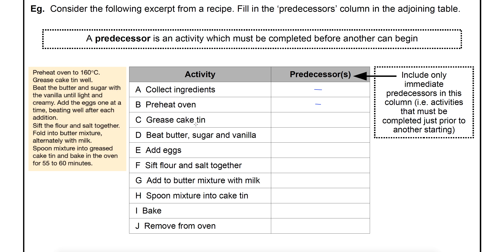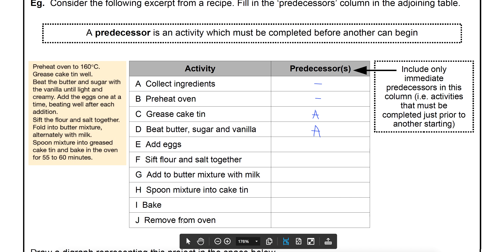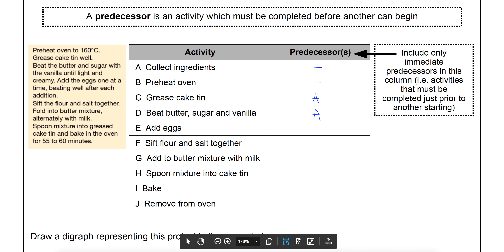The next one is to grease the cake tin. This one has a predecessor because you're going to need something to grease it with — whether it be butter or oil. So you'll have needed to collect your ingredients before you do that, meaning A is listed as a predecessor. Likewise, activity D — beating the butter, sugar, and vanilla — can't be done until you've collected the ingredients, so A is its predecessor too. C and D can be done at different times and are not predecessors of each other. Adding the eggs (E) requires D to be completed first, so its predecessor is D.